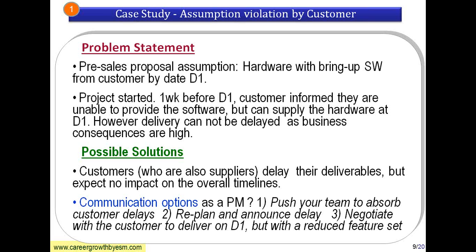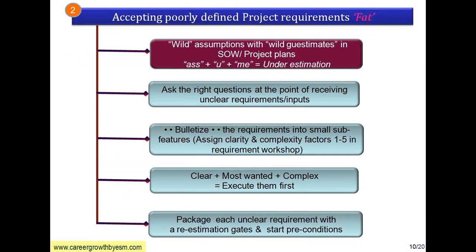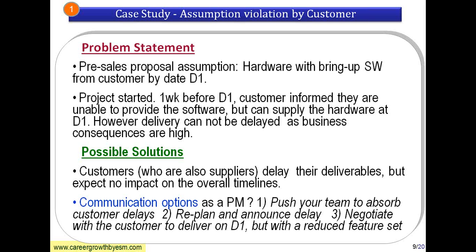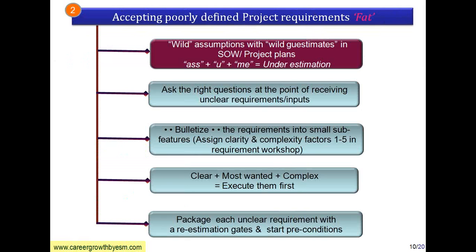Take the high-clarity and high-complexity requirements first for analysis. Focus on the requirements that are clear, most wanted by the customer, and complex to implement — take them first and execute. For unclear requirements, package each with a re-estimate gauge. Go back to the customer to seek clarity, or propose certain requirements back to the customer and get them approved. This is how you convert an unclear requirement back into clarity.